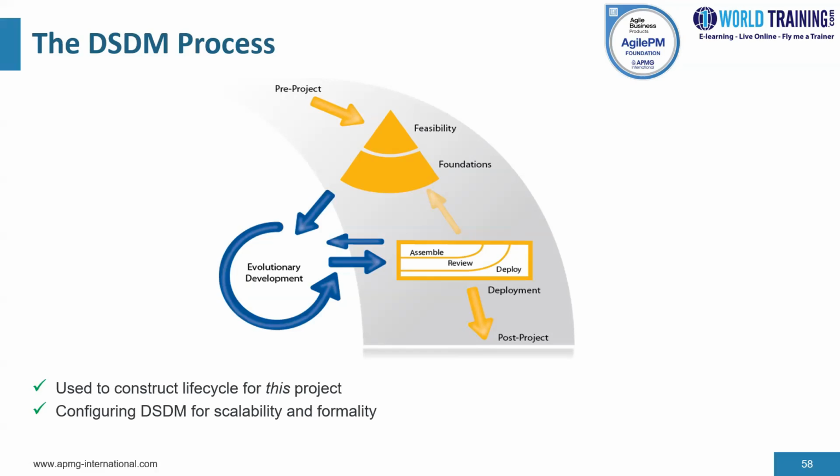So the next phase is the foundation phase. The foundation phase basically takes the preliminary investigation from feasibility to the next level. It is intended to establish a fundamental but not detailed understanding of the business rationale for the project, the potential solution that will be created by the project, and how development and delivery of the solution will be managed. By intentionally avoiding low levels of detail, the foundation phase should last no longer than a few weeks, even for large and complex projects.